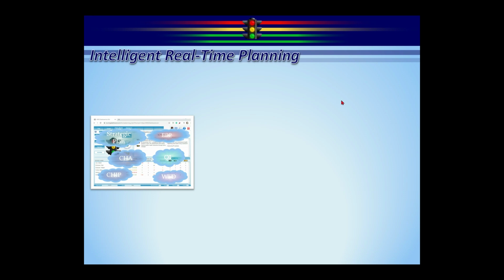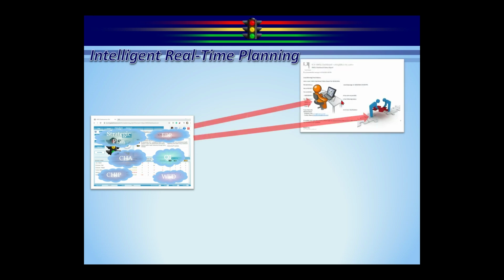Number 1, has this person been in the last 30 days and updated their stuff? Number 2, does this person have anything that has fallen behind schedule? And number 3, does this person have anything that's overdue, meaning today is past the ending date of the activity and it's not yet 100% complete? If none of those are true, no spam. If any of them are true, out go the emails.